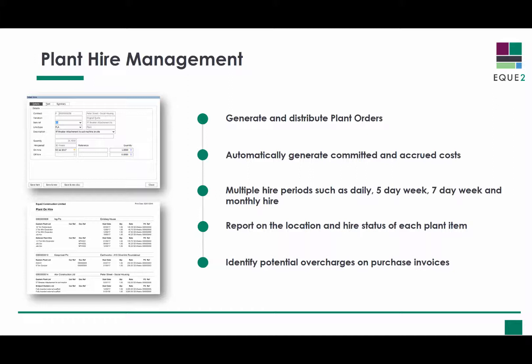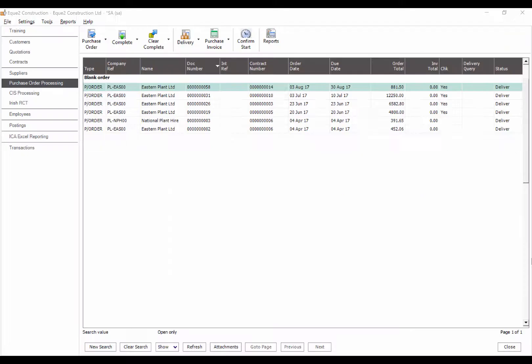By matching purchase invoices to the actual hire period, Construct4SAGE will warn you about any potential overcharges. All plant orders can be viewed from the purchase order processing module.